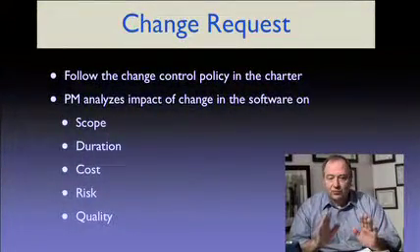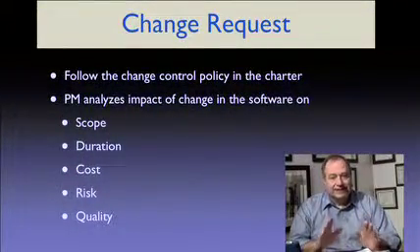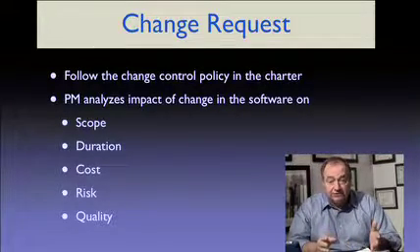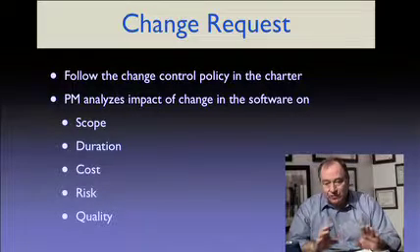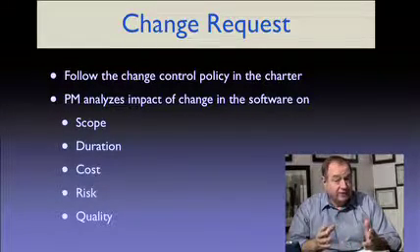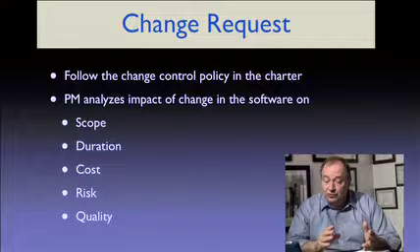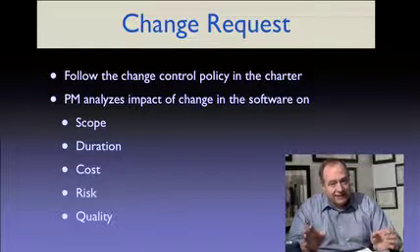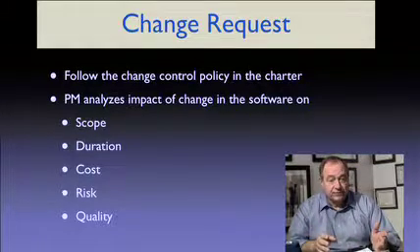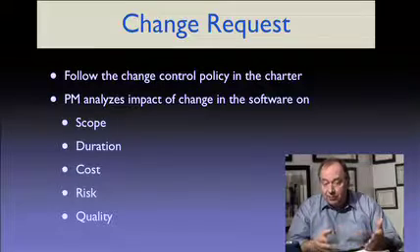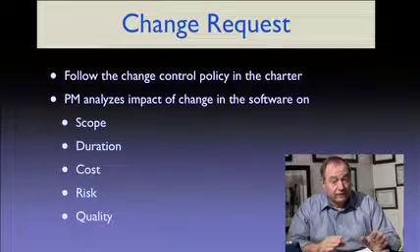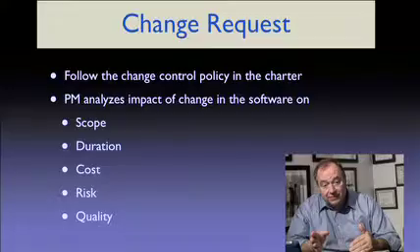An important part of the weekly status cycle is handling change requests that alter deliverables, the duration, or the budget. Now, the PM's role is central to good change control, and it follows the change control procedure that was approved in the charter way back when. Usually the PM analyzes the impact of any submitted change and then writes up a summary report with a recommendation to approve or reject the change request. That goes to the sponsor for review and the sponsor's decision making.